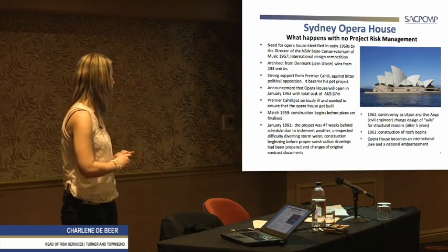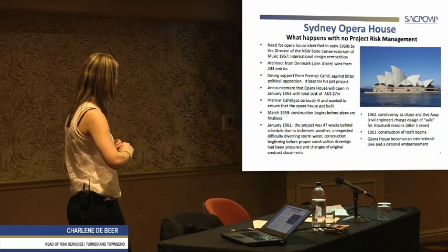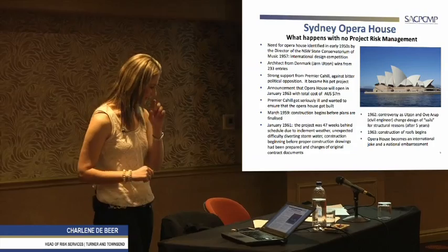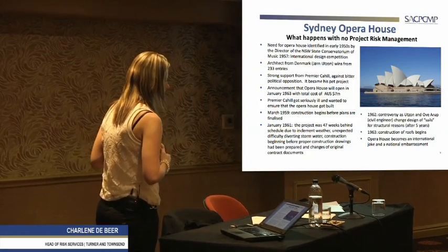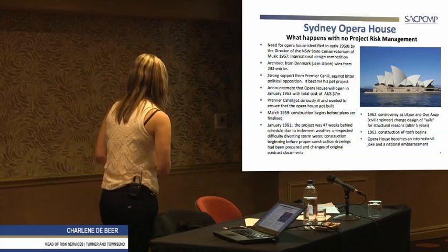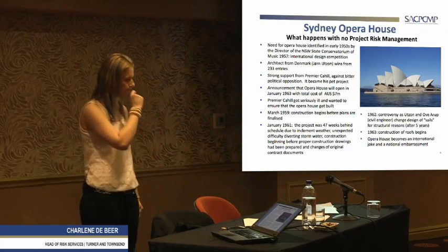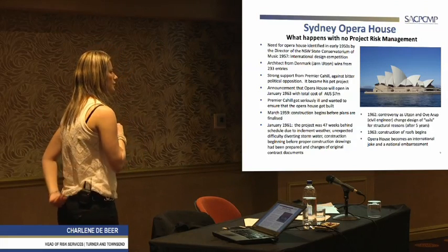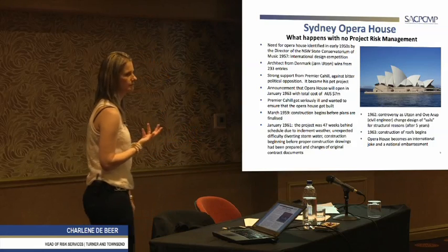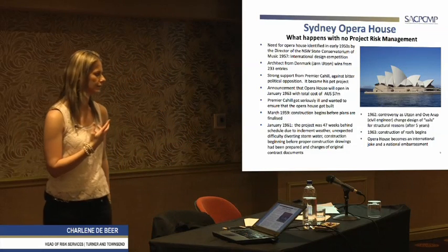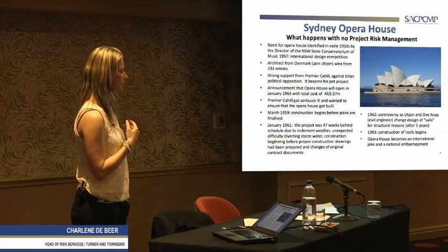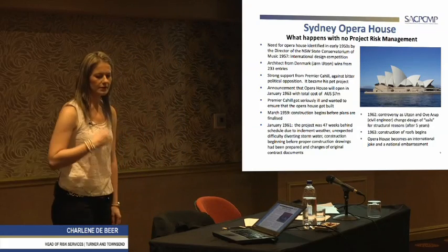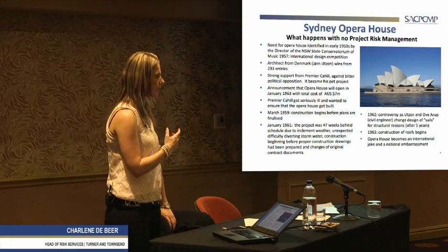And that's one of the things the Sydney Opera House did as well. They started construction before the plans were finalized and before they saw the entire picture of what the Sydney Opera House should look like. So in 1961, only 2 years after they started, the project was already behind by 47 weeks. So in 2 years, you've lost a year, basically, but more than a year, which is quite shocking if you think that they have overrun on schedule by basically 100% already. And there were various reasons. It wasn't only assigned to design not being finalized.